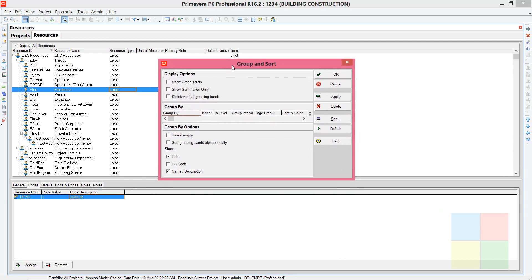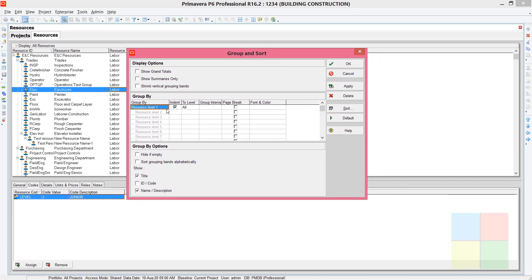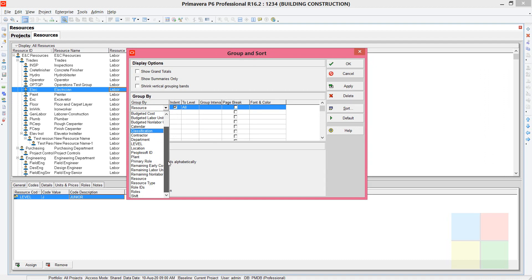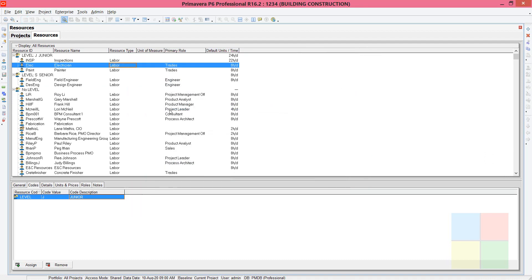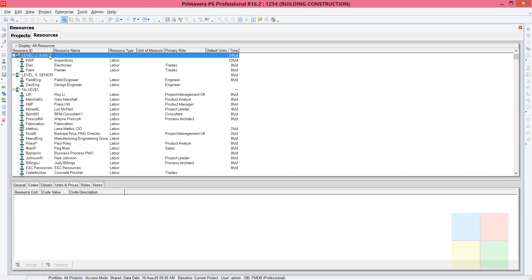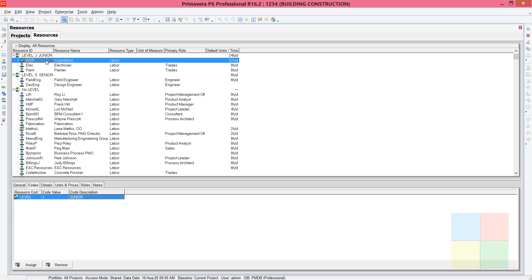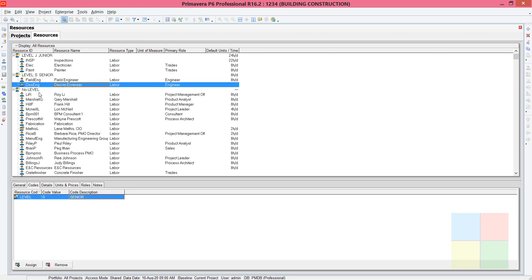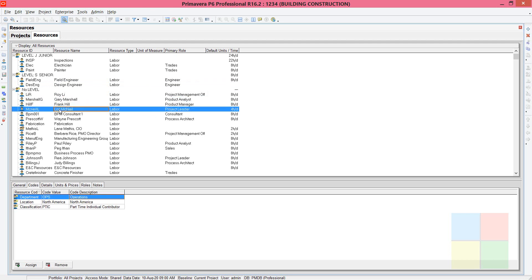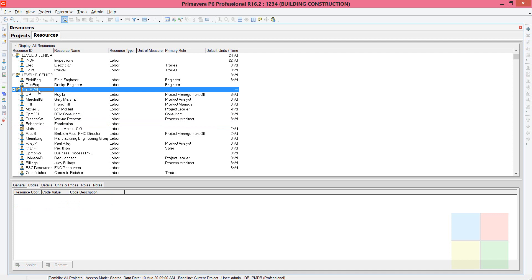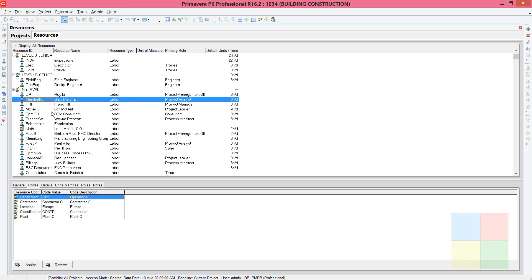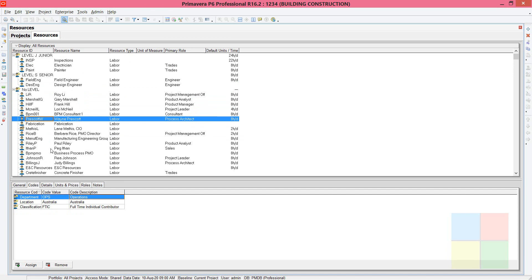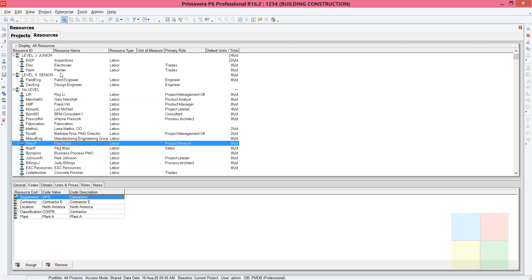Go to Customize and maximize the dialog box. Search for Level — there are many options but search for Level — then click Apply and OK. As you can see, under Junior resources we have Inspection, Electrician, and Painter. Under Senior resources we have Field Engineer and Design Engineer. Resources we did not assign come under a system-created code called 'No Level'.